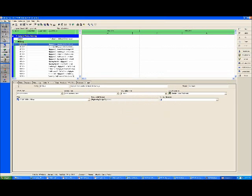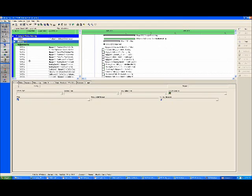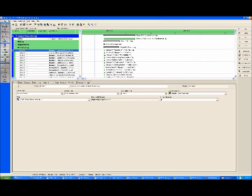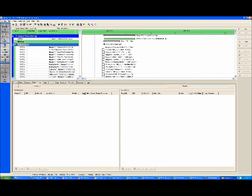And I'm going to go take a look at the activities. And I need to find them, and they're in here someplace. So there they are in the month of April. And they haven't been scheduled yet, but I'll collapse the milling WBS, show the adjustments, I'll collapse that and show the resurfacing. And if I highlight that one resurfacing and go look at the relationships, it tells us that the predecessor is adjustments, and the activity ID is 61590, and that came from the spreadsheet. So as we all know with P6, the next thing we need to do is schedule it.